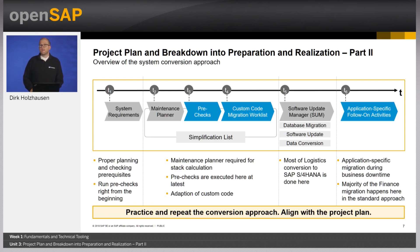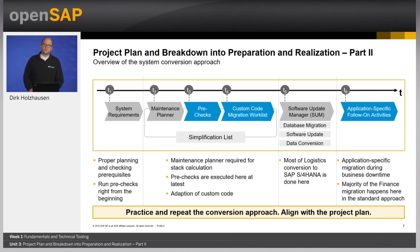Third, the conversion itself is executed using the Software Update Manager (SUM tool). The tool executes the database migration, the software update, and the data conversion to the new S4HANA data structures. Most of the conversion — specifically for the logistics part — is done here. Fourth, after the software upgrade tool is finalized, further activities must be executed: so-called application-specific migration activities that are part of the business downtime. Most of the final conversion is done as part of this step. It is recommended to practice this on the sandbox and to consider several runs during the project. Details about the conversion can be found in the conversion guide.